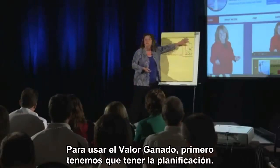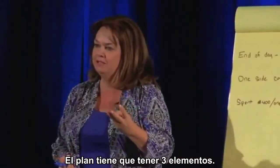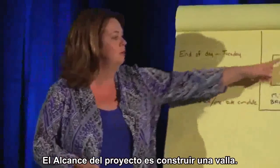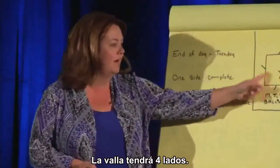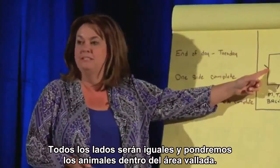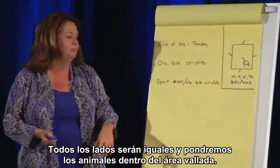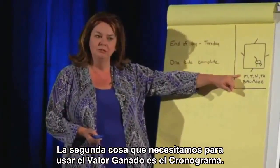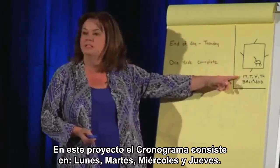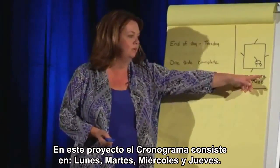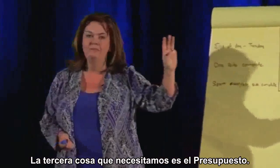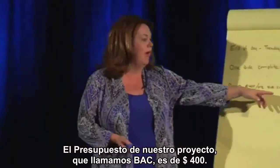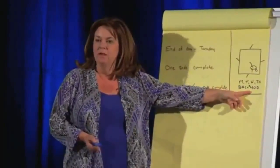To do earned value, first you need to have a plan. The plan needs three elements. First, the project scope — we're building a fence with four sides, each side the same, with animals inside. Second, a schedule: Monday, Tuesday, Wednesday, Thursday. Third, a budget.